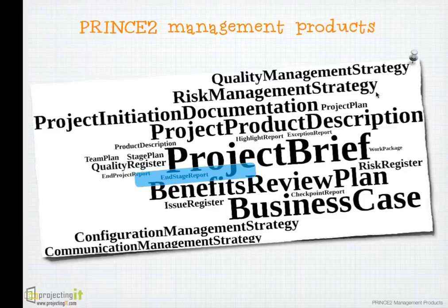Similarly, we have the end stage report that is done at the end of each stage or milestone by the project manager to help the project board understand the status of the project and to decide what to do next with the project. In the same way, all other project management products help in capturing some information about the project, which could be to do with plans, reports, or tracking information. We'll have a quick look at these deliverables, what they contain, why they are used, and by whom.